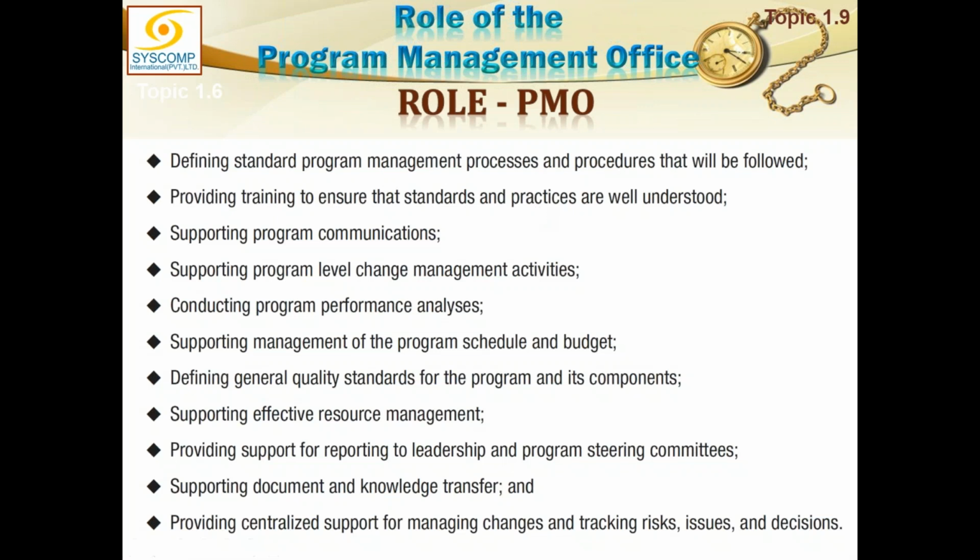Generally, this is what the PMO does. So it has been defined at the program level. Supporting program communications, supporting program level change management activities, conducting program performance analysis, supporting management of the program schedule and budget, defining general quality standards for the program and its components, supporting effective resource management, again at the program level, providing support for reporting to leadership and the program steering committee, supporting documents and knowledge transfer, and providing centralized support for managing changes and tracking risks, issues, and decisions.